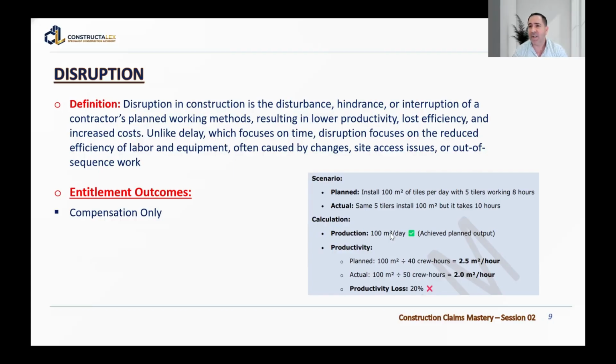and because of this it will cause extra cost to the contractor, because instead of these 5 workers working only 8 hours and the salary being for 8 hours, I have to pay 2 hours extra to install the same quantity.